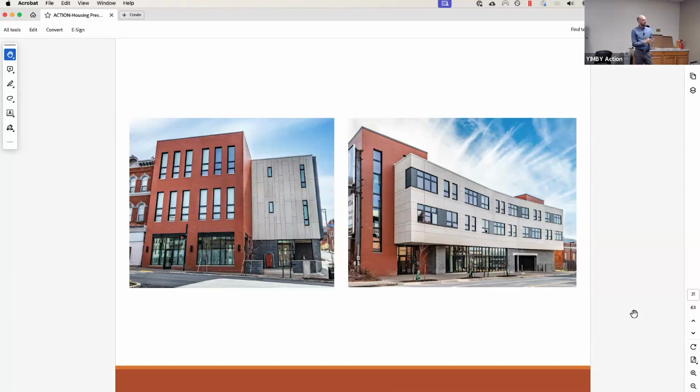In this one in particular, if we could have just done whatever we wanted to do, we would have built the building on the right and we would have taken it up one story, maybe two, depending. Because when you build two buildings, you pay for a lot of things twice. You do the same things over. A lot of the infrastructure in one building you'd only have to pay for once. So that really upped the cost of this project. And then of course, COVID added a lot of other costs and other issues.